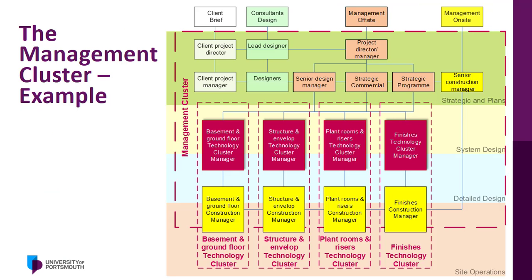The management cluster includes the client, the designers, and the managers. These three groups, although they are represented in each of the project technology clusters, would be dealing with strategic issues and plans, handling the interfaces between the clusters, doing trade-offs, and making sure all key issues between the technology clusters are raised and dealt with. At the outset of the project, the management cluster would define the project clusters, the roles and responsibilities, and set the framework for collaborative working.